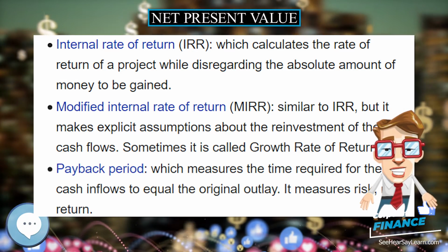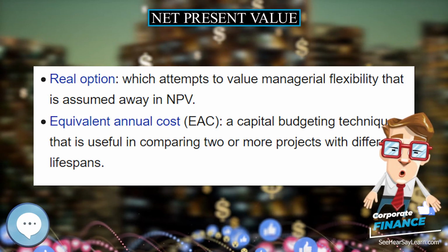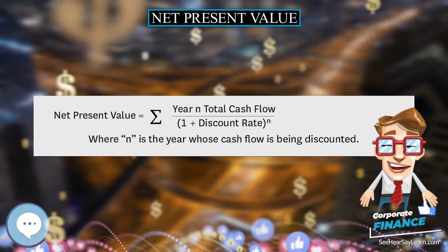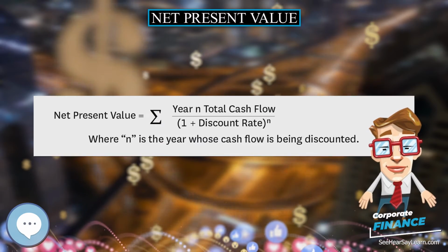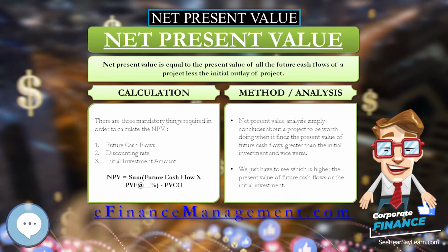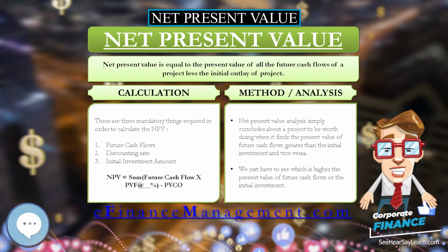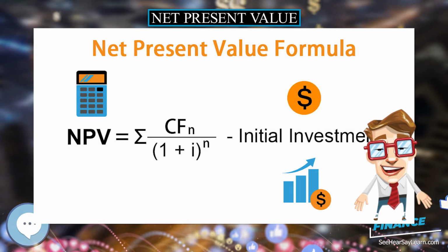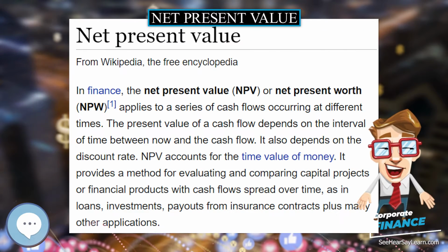Another approach to choosing the discount rate factor is to decide the rate which the capital needed for the project could return if invested in an alternative venture. If, for example, the capital required for project A can earn 5% elsewhere, use this discount rate in the NPV calculation to allow a direct comparison to be made between project A and the alternative.